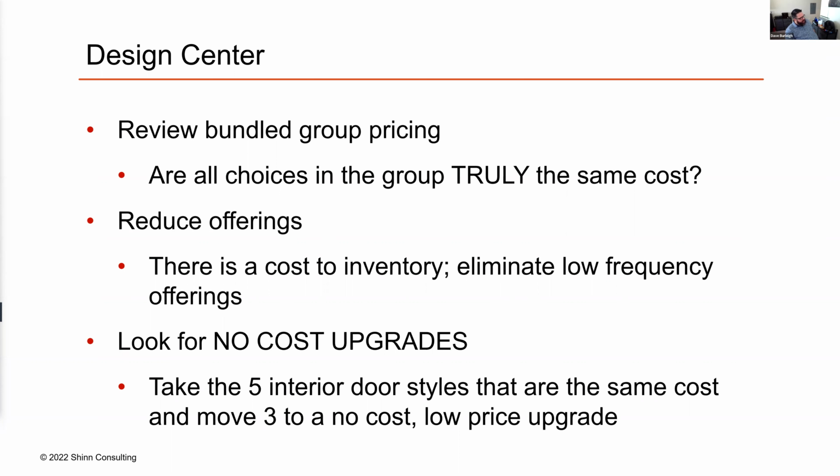They're really going to average to the high end of what that is, so that I can have just one price fits all for that group. But if I really look at that blended average, I have a wide swing where I'm overpaying. If I have 3 doors, I'm probably overpaying for 2 of those doors every time I sell them.